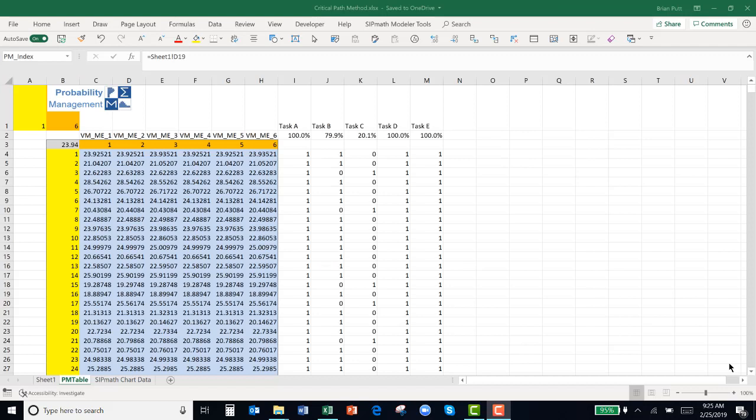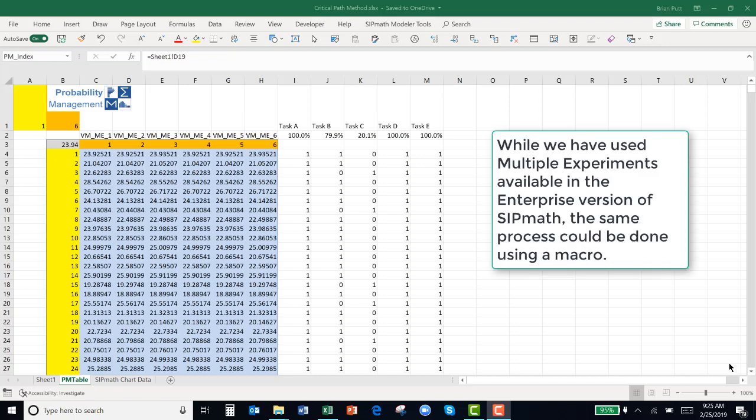SipMath sets up a worksheet called PMTable. And I have run SipMath using multiple experiments. What does that mean? It's actually run 10,000 simulations. This goes down for 10,000.